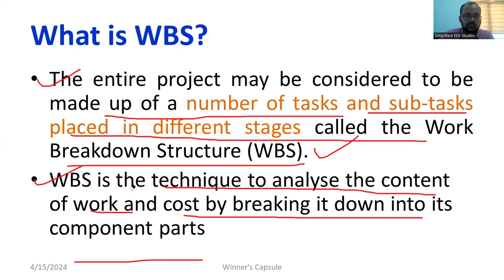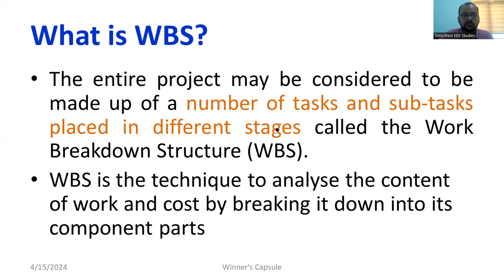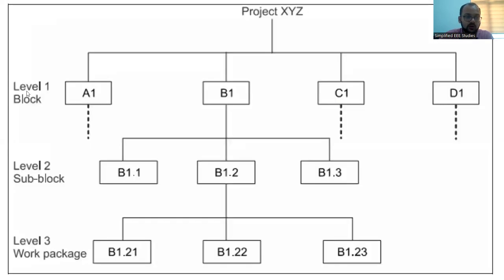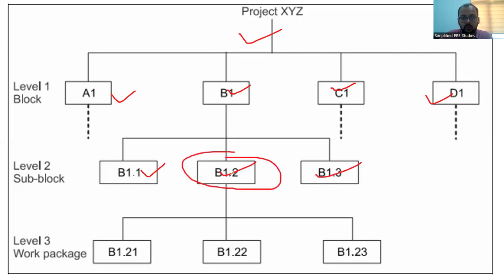The complexity is reduced and ultimately we gather all the work assigned by the various teams — this is Work Breakdown Structure. I will show you a diagram which clearly identifies the significance of WBS. The total level has tasks A1, B1, C1 — these are the different task points. B1 is divided into B1.1, B1.2, and B1.3. Since B1.2 may be a little complex, it is further divided into B1.2.1, B1.2.2, and B1.2.3 — to reduce complexity and complete the work on time, since a single person or team cannot take up all the work and responsibilities.